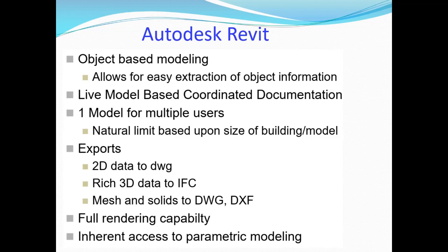So I give the information on the model. What is the area of the opening? Each opening, what's the area, right? After we finish the model, I'd like to know how much steel cost I can save from this opening, because I want to do a comparison study of castellated beam and steel beam. Steel beam is maybe more weight but production cost is less. Castellated beam is maybe less weight but production cost is more. Now I want to do the cost comparison. Which one is cheaper for this particular building?